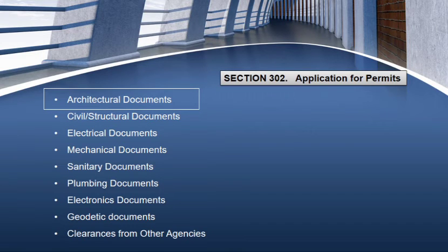And this includes A, architectural plans or drawings; B, architectural interiors or interior design; C, plans and specific locations of all accessibility facilities at a scale of at least 1:100.